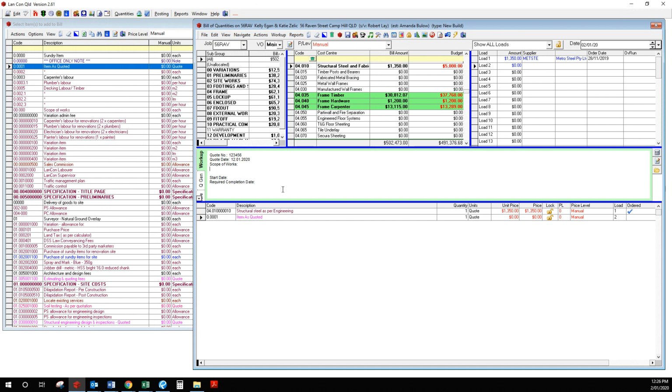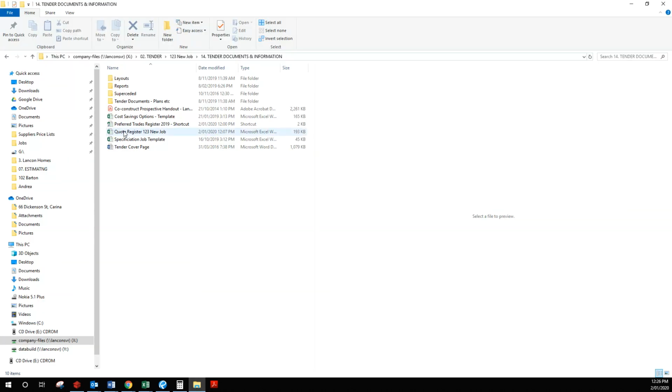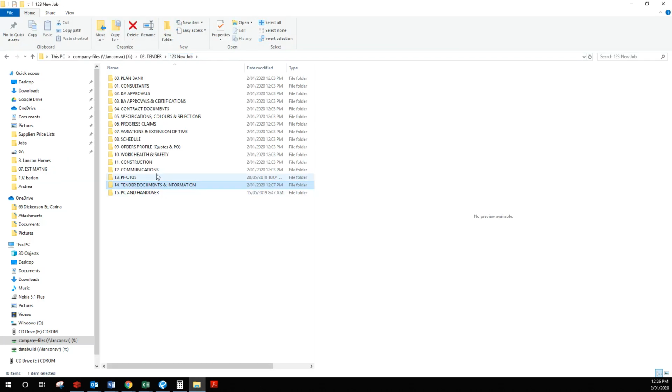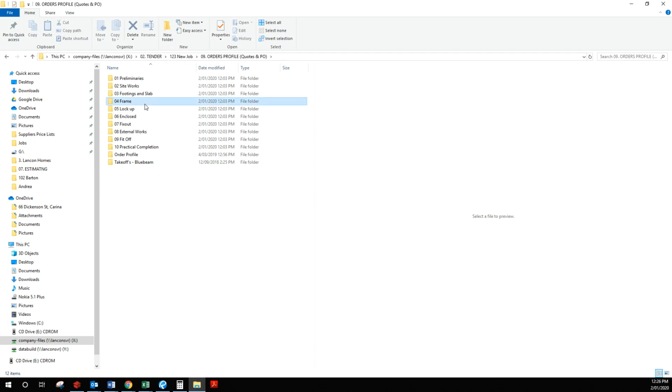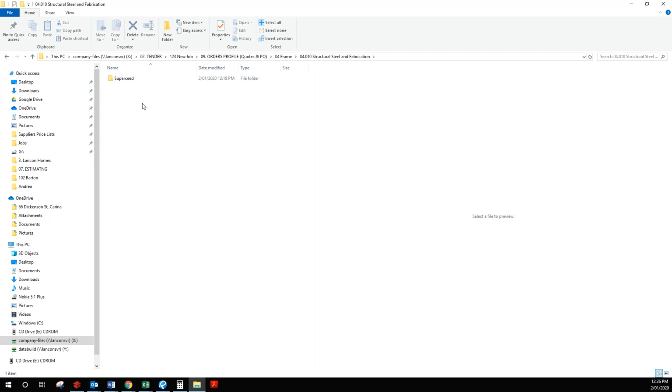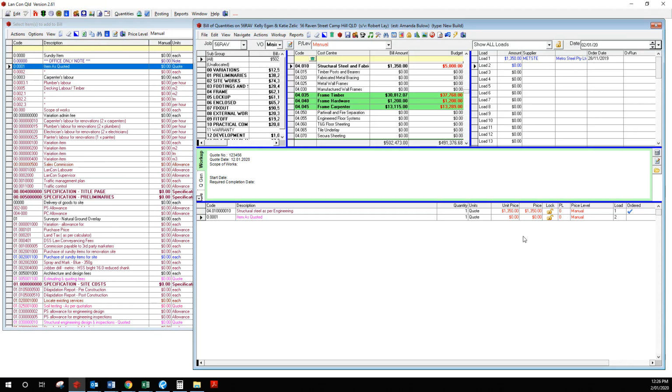Now, that means that if you copy in, 2 posts in the beam, if anyone was checking this, they could go, oh, that's right, we got new engineering, there was the alfresco needed, and they would know that that item needed to be updated. They could then request an additional quote, and they could go back into this folder here, back into here, they could supersede your version 1, and they could request version 2, save it here with the alfresco, and then update that.